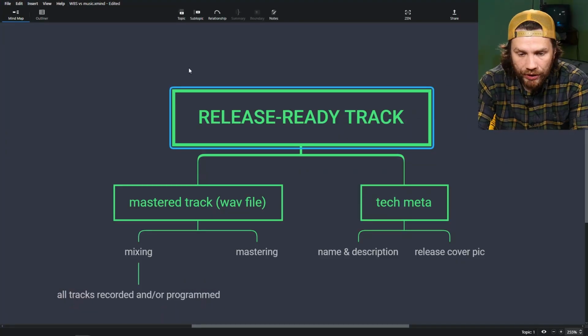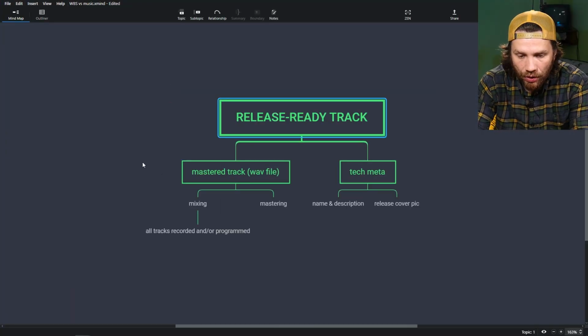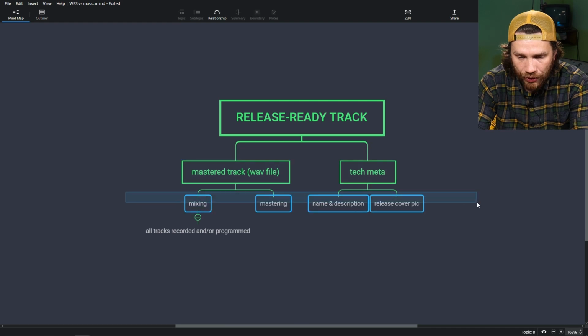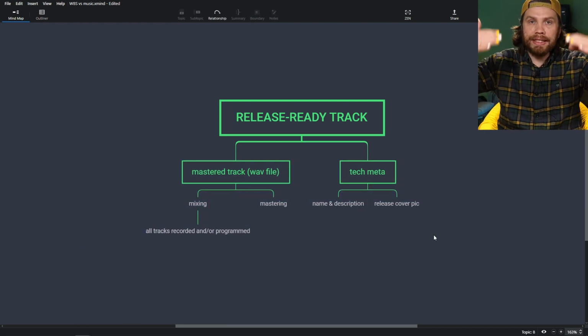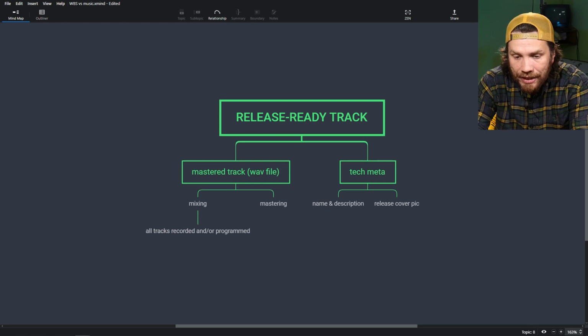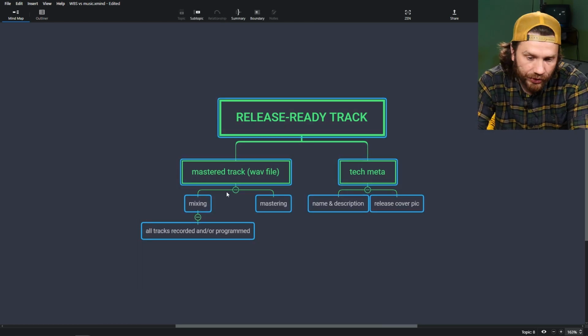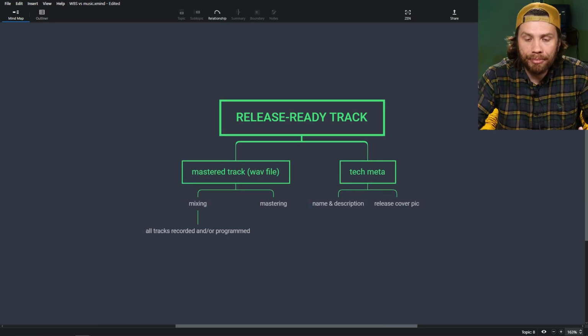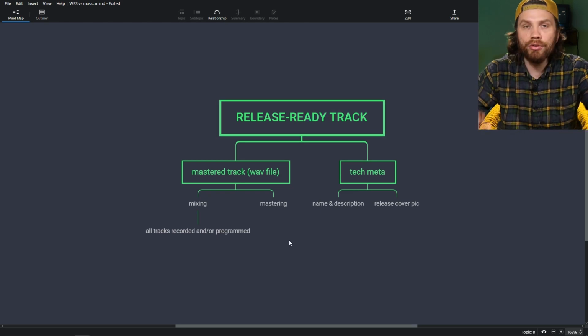This is usually called level 0, the actual outcome. This is level 1, this is level 2, this is level 3. So we're going deeper and deeper level by level. And that is what a work breakdown structure looks like. Technically, it's a mind map that has hierarchy. So the higher up, the closer to the actual outcome the thing is.